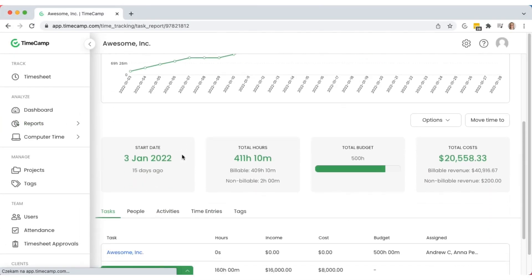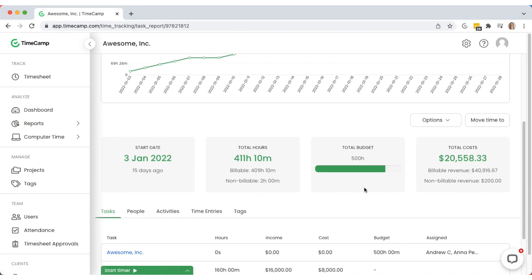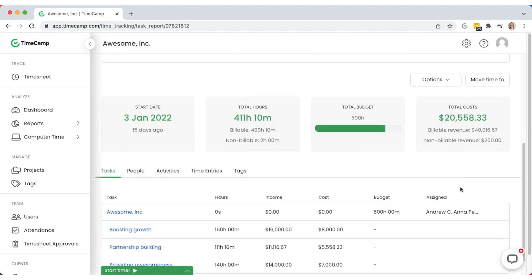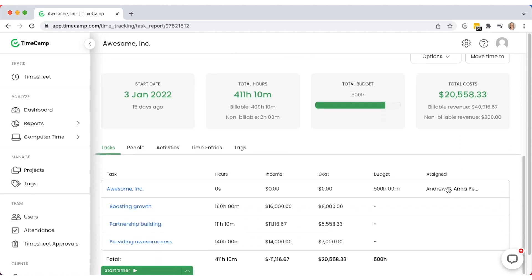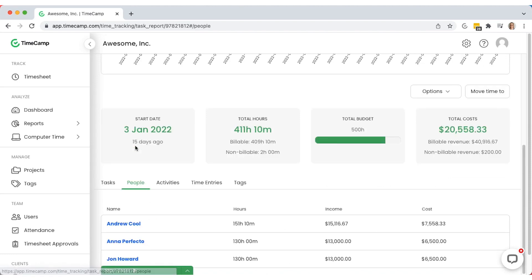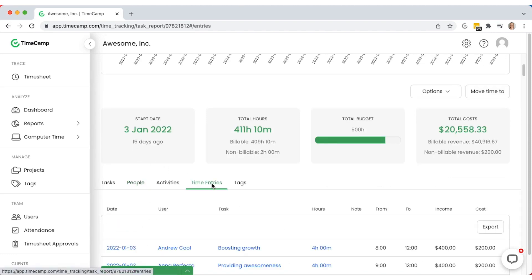In the details, you can see the total hours tracked with billable versus non-billable ratio, budget, and revenue versus cost. You can use the tabs below to check the project report by people, tasks, or detailed time entries.